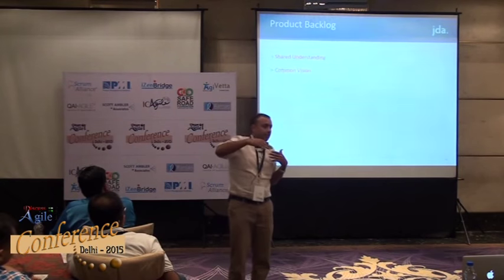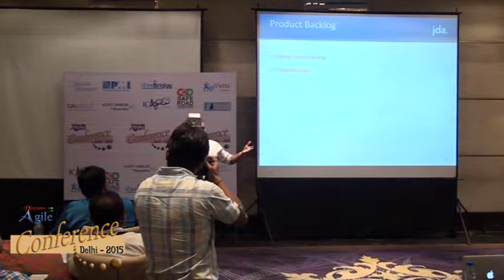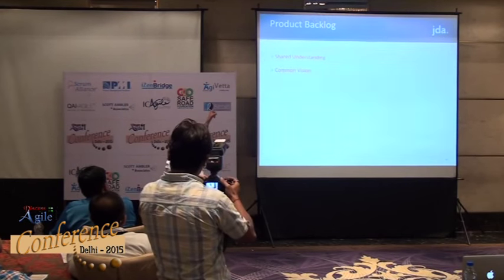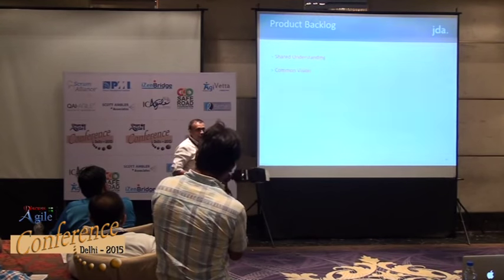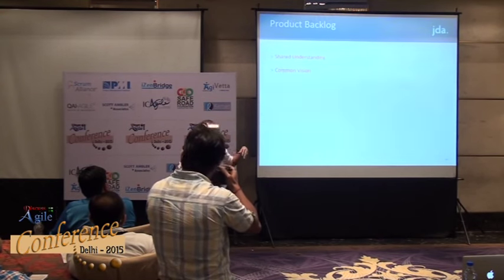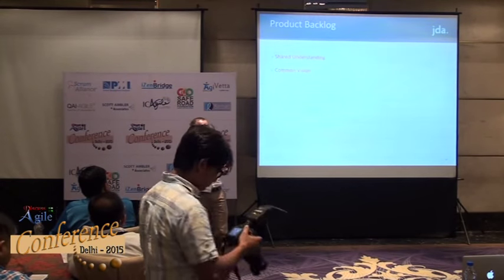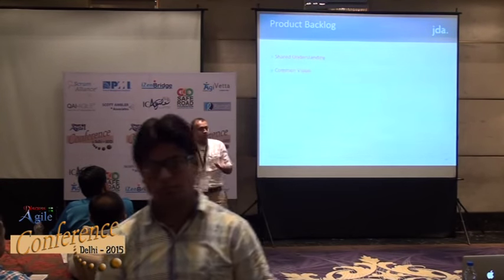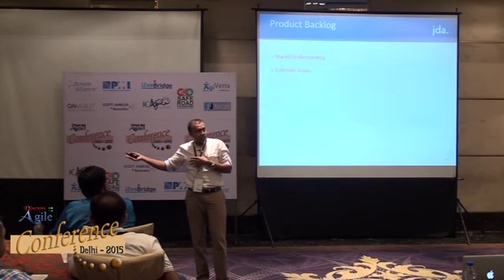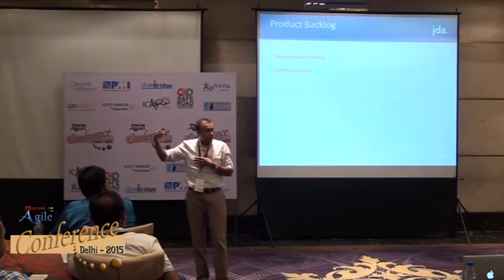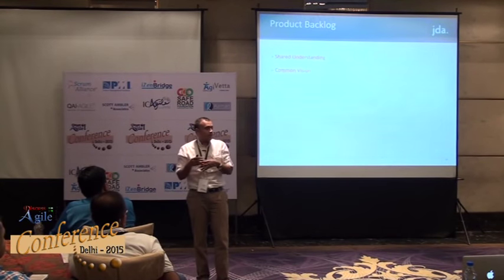Unless the team, probably the product management is very well aware about what it is and how it's going to be, and so that's why it's in priority order. But unless the team really understands, many times you may get a question back to the product owner, maybe at demo time, which is normally pretty late, asking why do we build this? Because probably there's another feature in the backlog which is more valuable, or if you build that first, it's going to add more value to the customer.